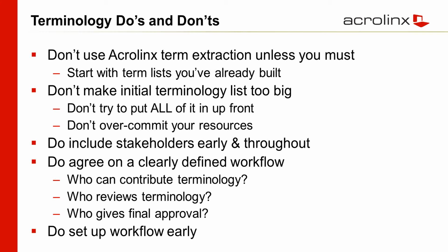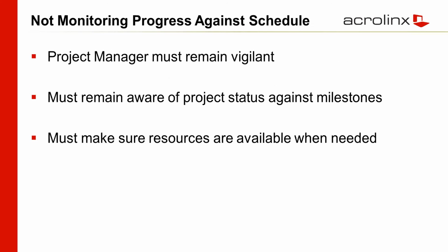Anyone who cares about terminology needs to be included early and throughout. You can't ignore them till the end, because they can throw a flag on the play and stop you at the end. Make sure everyone agrees on a workflow for how you're going to decide who can contribute, who has to review it, and who gives approval. And set that workflow up at the start. Okay. Don't mean to yell, but this is an area that can cause some pain.